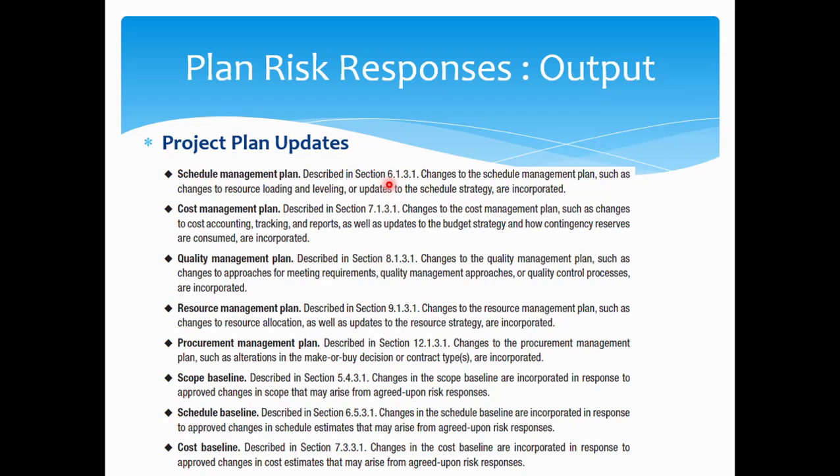Forget about these sectional references, but I just want to tell you how risk responses affect the project plan. Any risk response can affect your entire project sub plans that you have in hand. Some risk responses can change the resource loading levels, the resource leveling that we discussed. Maybe you will have to increase your resource leveling or resource smoothing levels that we discussed in our previous sessions.